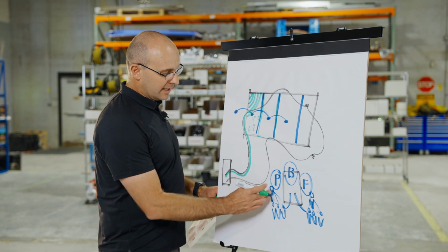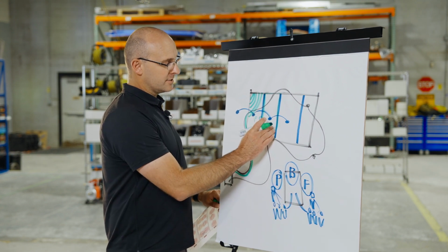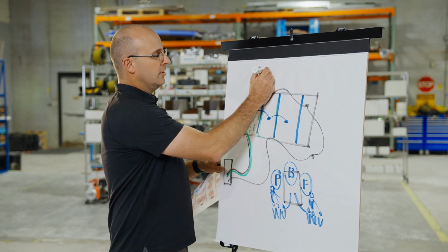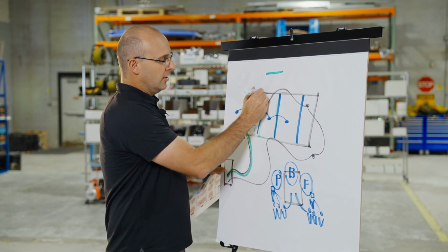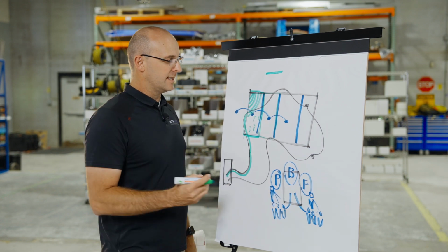And now, again, you're planning, building, and finishing, right? So you're planning, building, and finishing. And your zone control walks are saying, within the duration of the activity, are they going to meet their work or complete it within that zone?